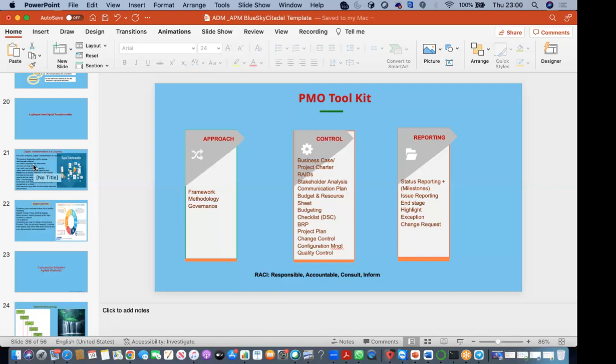So in reporting, when we talk of agile, especially when you are in Scrum, you have the sprint report. The sprint report helps you to know how many user stories you have committed to, and how many of those user stories you have delivered. It also helps you, if you calculate your velocity well, to know the speed at which your team is delivering.